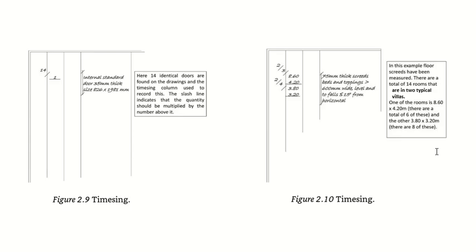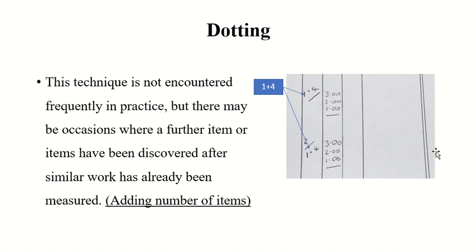To avoid this confusion and give him the instant response, we write the numbers one by one. So instead of writing 6 and 8, because they belong to 2 different structures, we are writing 2 into 3 and 2 into 4. Got it?